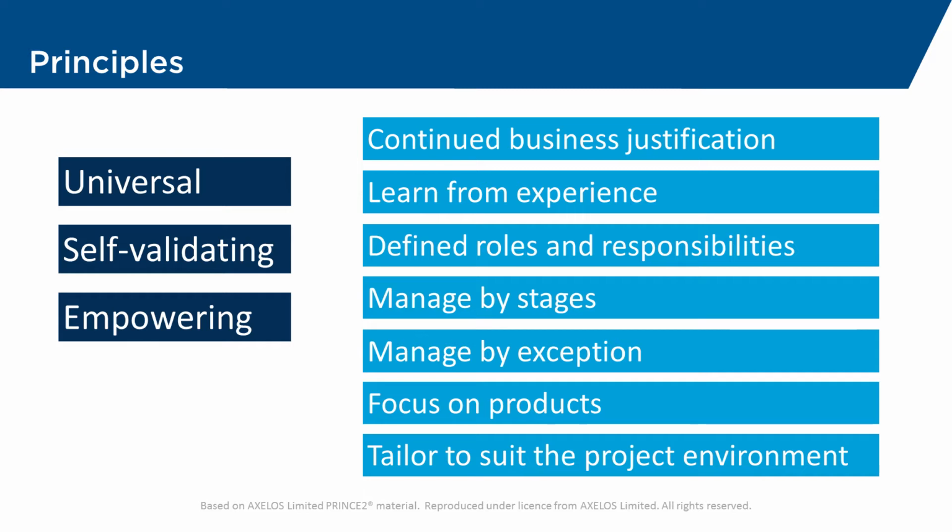Managed by stages. It's important that we try not to look at the project big picture all at once, that we can break it down into much more manageable chunks. This way we're better able to understand them, to measure them, and to communicate about them. It's also useful when we're monitoring and controlling, because we can monitor and control as we go along using those stages, those bite-sized chunks.